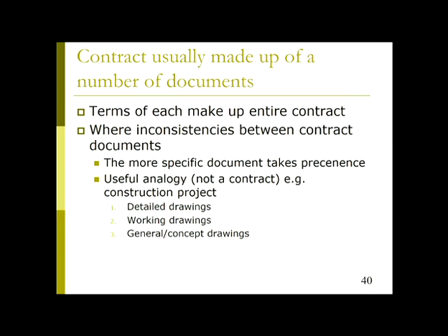Now, I've already said that contracts can be quite lengthy and complicated documents as well. And so there may be variation across a document. We mentioned previously that you might have a document where there appear to be conflicting instructions in one area as opposed to another, instructions about essentially the same thing. When interpreting these sorts of documents, the general approach is to go with the part of the document that gives you the most detail.